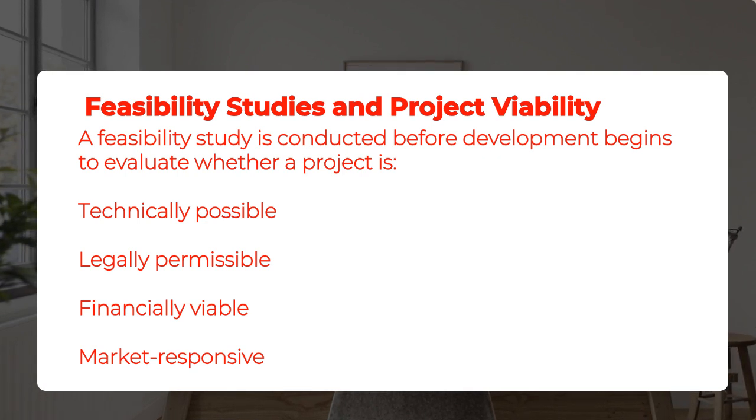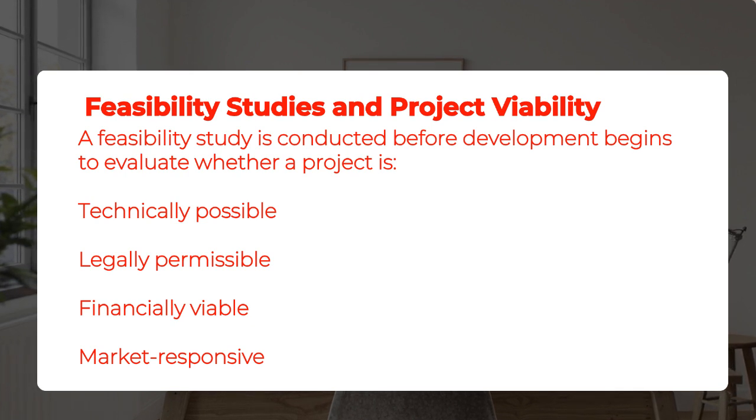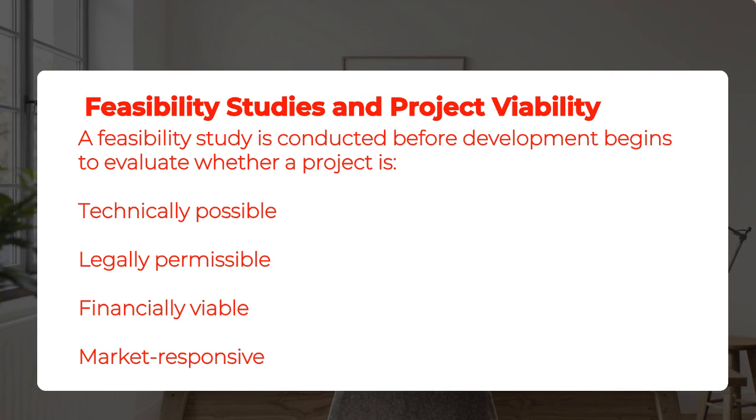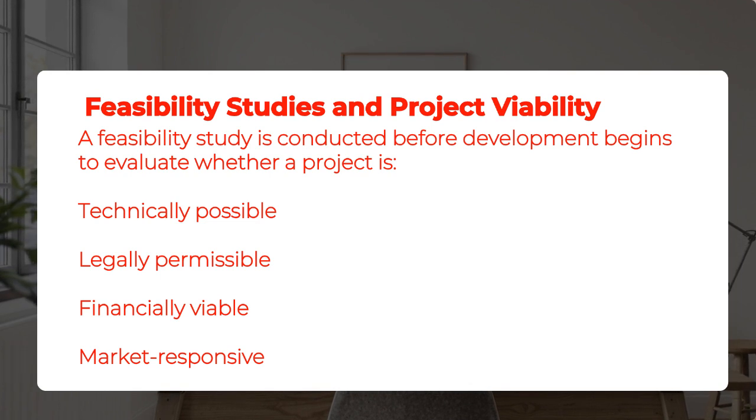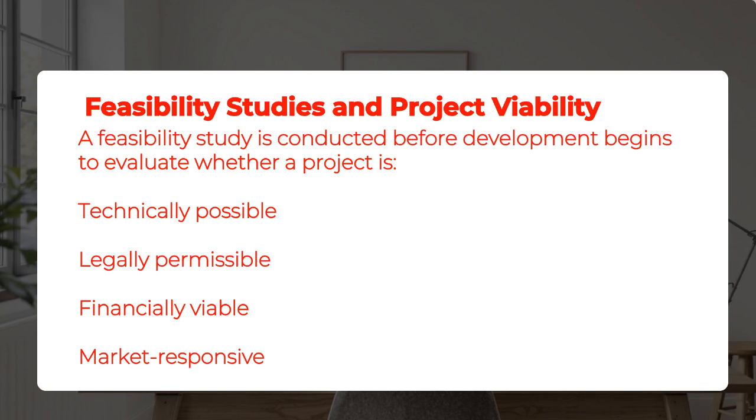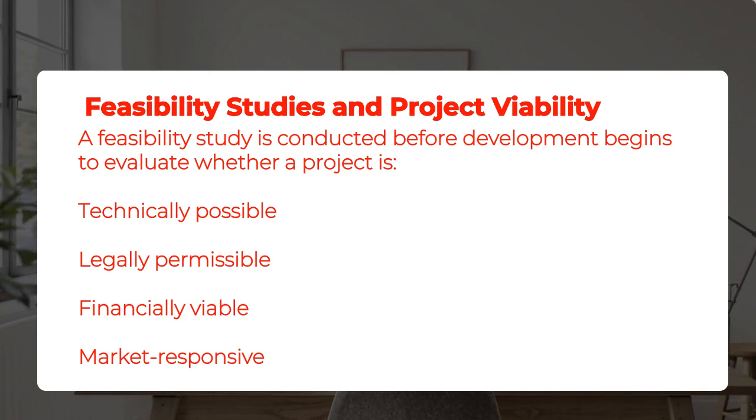3. Financial modeling. Projected costs, sales, rental income, ROI, IRR, break-even point. 4. Risk analysis. Inflation, policy changes, cost overruns, competition. 5. SWOT analysis. Strengths, weaknesses, opportunities, threats. A feasibility study saves millions in losses by preventing poorly planned developments.